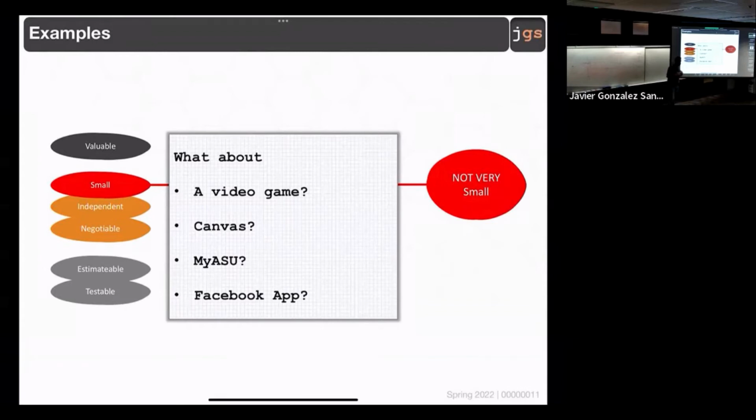If I were you, step number one, start reviewing if whatever is in the sentence is valuable. Valuable is something that the customer wants, yes or no. Is that sentence something that the customer of this system wants me to do? If the answer is yes, continue. If the answer is no, forget it. That is not a requirement, even though you want to do it. That is easy. I put that in black because it's kind of obvious, but it is step number one, always, the most important one to decide whether it is a requirement or not.